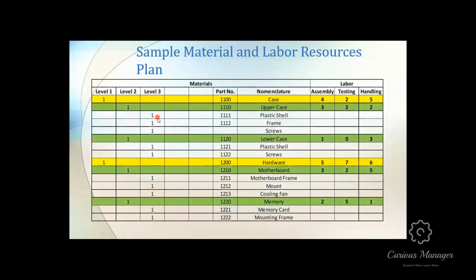And then level 3, basically I have as consumables or bottom level assemblies that don't require labor. So from here, level 1, level 2, these would require assembly. And as you notice, I added a quick labor tally. I basically gave it 3 tasks: assembly, testing, and handling. And these are in hours, 322 and 103. And basically, I add up all of these to equal here.